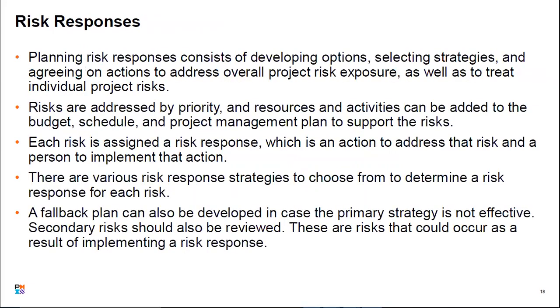After you've identified your risk, assessed your risk, and analyzed your risk, you now need to plan risk responses. Planning risk responses consists of developing options, selecting strategies, and agreeing on actions to address overall project risk exposure, as well as to treat individual project risks. The risks are addressed by priority, and resources and activities can be added to the budget, schedule, and project management plan to support the risk response.